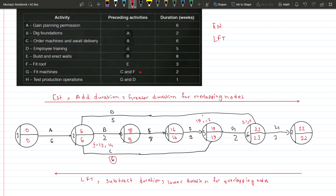That's how you calculate LFT and EST for your diagrams. Now we need to determine the critical path. Critical activities are activities which cannot be delayed — if we delay them, the whole project gets delayed. To identify a critical activity: if the EST and LFT at a node are the same, it is a critical activity. So H, G, F, E, B, and A are critical activities. D and C are not critical, meaning we can delay C or D without delaying the overall project.